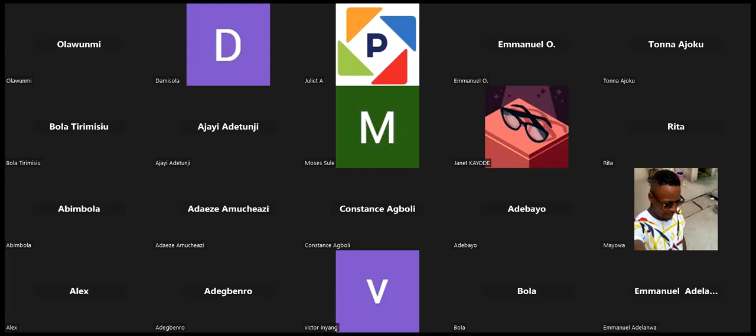If I choose 3, because at work we don't use 1, we start from 3, 5. But normally the theory behind it is 1, 2, 3, 5, 8, 13. Then the biggest, Olawumi said at our organization they cap it at 20. My organization will cap it at 21. When we point towards 21, that shows we're going to split the story, so 2 QAs will work on it to test.